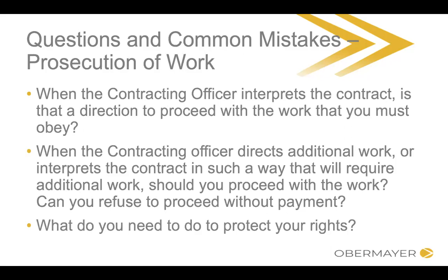If it's an express change, you need to follow whatever the mod did to change your contract. If you think you didn't get enough time or money as a result, you need to file a cost proposal and say, I want more time and more money. And then you need to litigate it from there. But yes, one of the drawbacks of doing business with the federal government is that you might need to self-finance work that's a change and continue to do that work while you argue with the government about how much money or time they owe you for it.